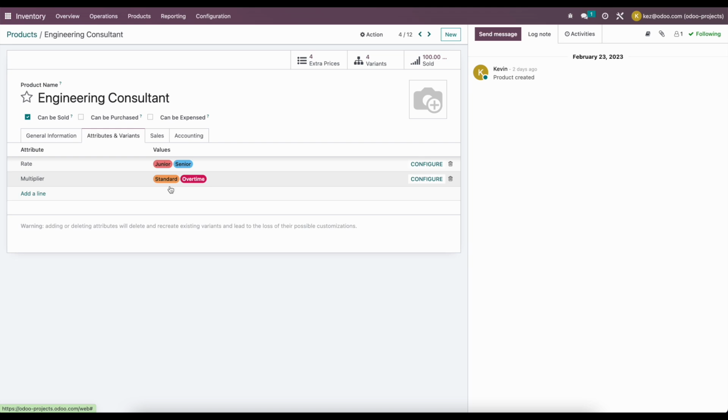We don't necessarily know who's going to be billing at the time of creation of the project. We just know that in general, we might bill 200 hours of engineering time, 200 hours of project management time, 100 hours of development time. It's just kind of a guesstimate, right? We're going to use some of the information that we have from previous projects, but at the end of the day, we're going to put whoever we have on the project to make sure that the project is successful.